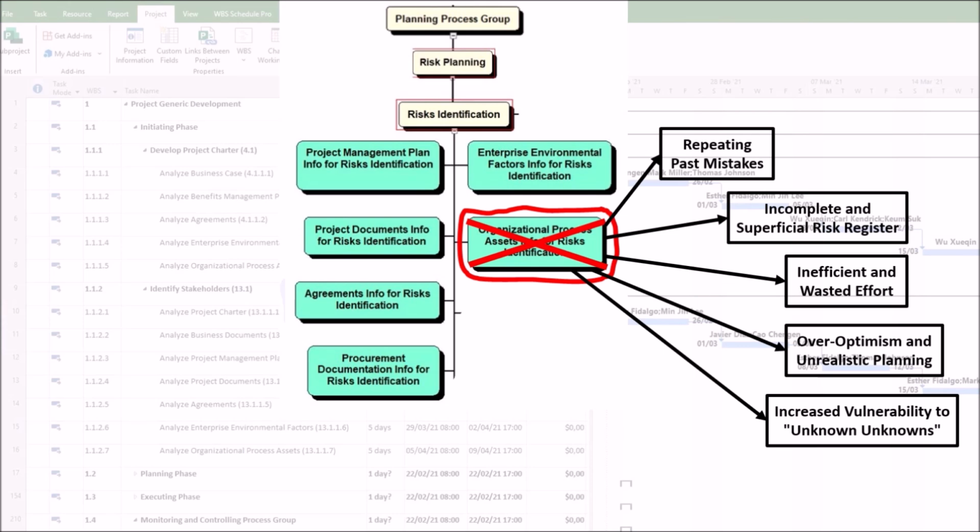These are the most dangerous kind, as they strike without warning and there is no plan to handle them. For example, a construction project in a new region is unaware that the local soil composition, a fact known from a past, small-scale project in the same area, requires special foundational work. This unknown becomes a major, costly crisis when discovered during excavation.